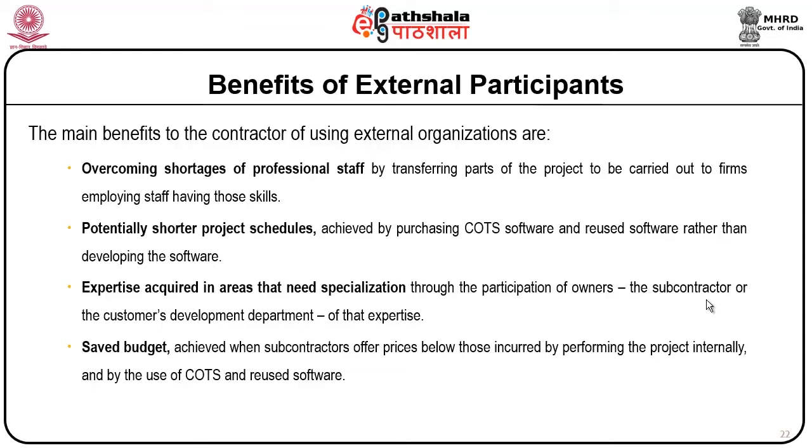Expertise is obtained in areas that need specialization through the participation of owners, the subcontractor or the customer's development department that holds that expertise. Saved budget is achieved when subcontractors offer prices below those incurred by performing the project internally, and by the use of commercial off-the-shelf software and reused software.